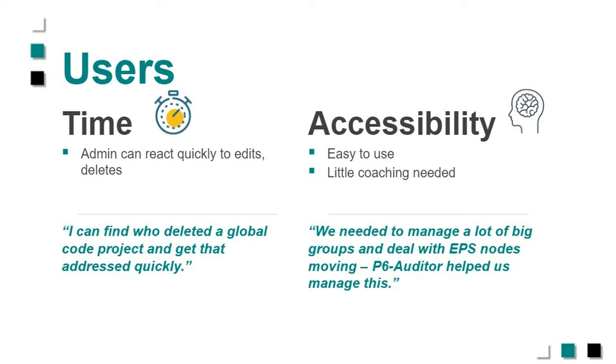And this is an important coaching moment. It also might help expose or highlight a gap in the way that you've set up the security. You might not have realized that you've given people too many nodes that they're accessing, and you could revisit the security, maybe adding a few more OBS layers, and secure those nodes so that they're not able to move a higher level of the EPS structure accidentally. This is something that I've definitely taken advantage of with more than one of my clients.